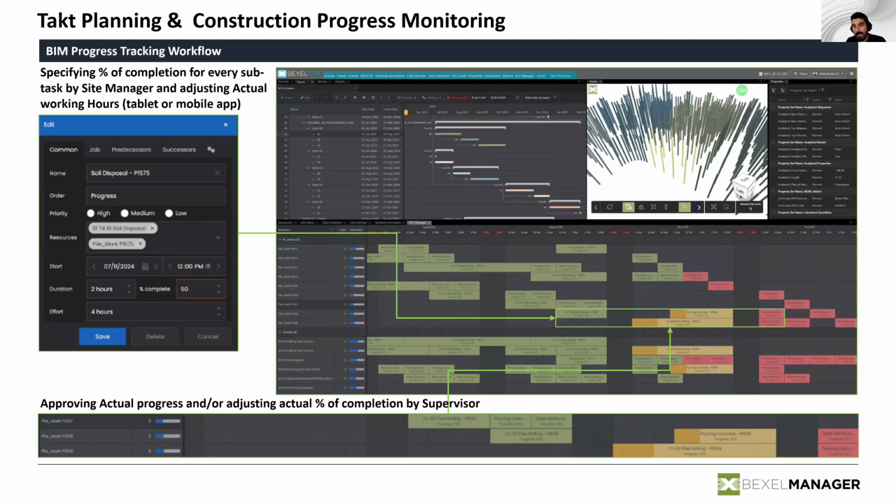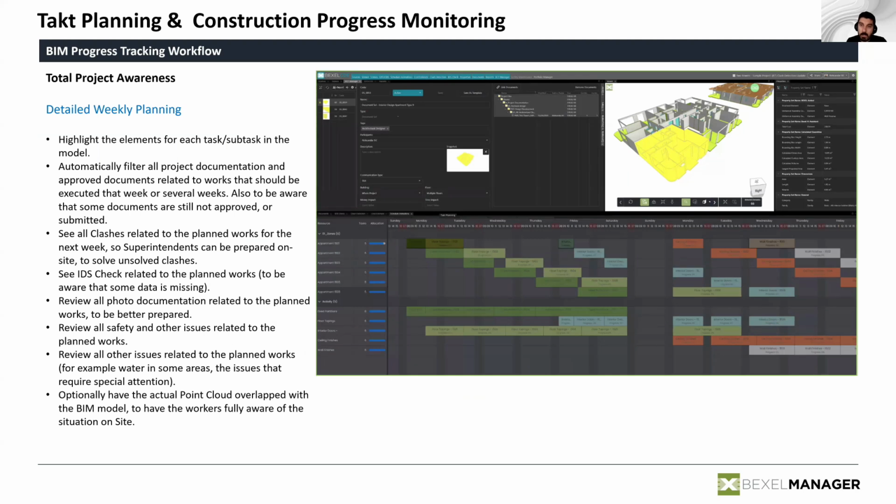We're cutting the times needed for reporting back the data. We have reliable data, and we are cutting the times needed to actually confirm the monthly certificates and to improve the cash flow of the subcontractors in this case. And not only this, another advantage is that this is maybe an even more intuitive example. So let's imagine that we have a schedule, that we have, let's say, finishing works on a high-rise building. And of course, in the schedule, we're going to probably have 15th floor, painting the walls. That's going to be the strategic schedule task. You're not going to go into details there.